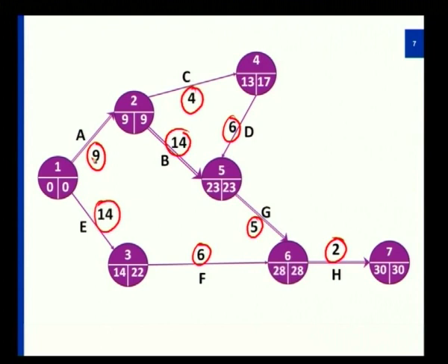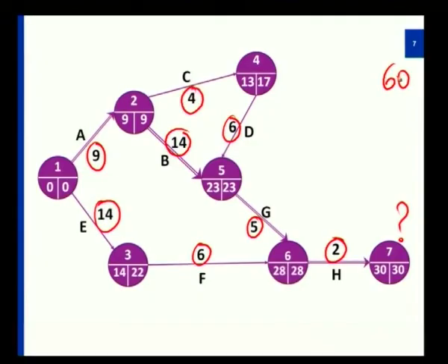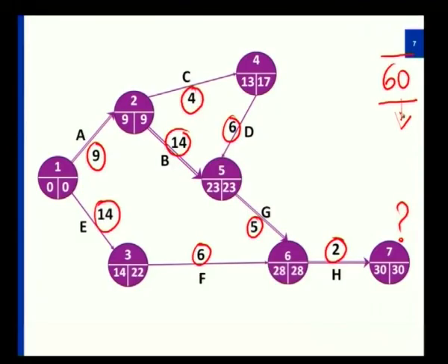So what happens at this stage? The customer can ask you a question: suppose I start a project at a given moment, when will I get the finished product? That is the question we are about to answer. If it is presumed sequential, we would complete it in 60 weeks, which is the calculation we got from the table. But we will not assume the same 60 weeks, because these projects are not executed sequentially, and since the project is divided among teams, we will be able to complete it in less time.